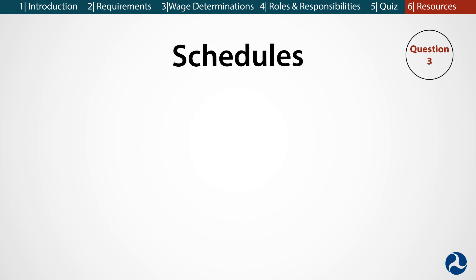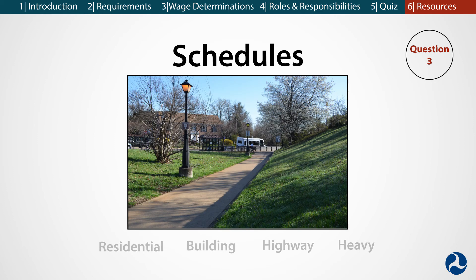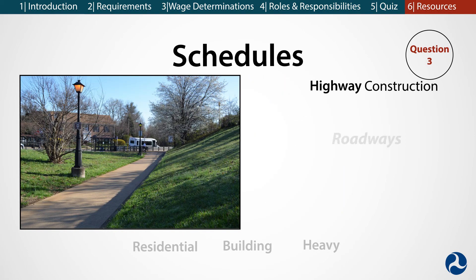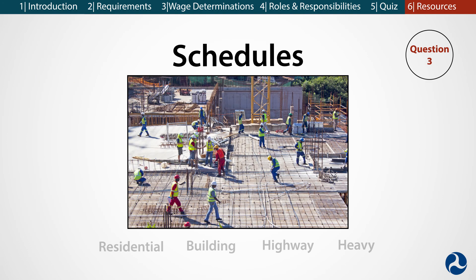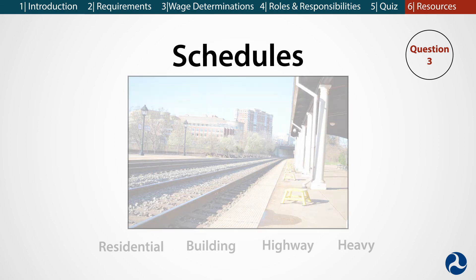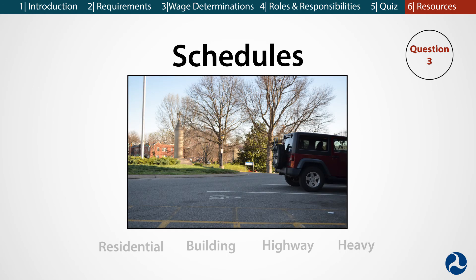Question 3. What schedules are associated with the following types of construction? The four construction schedules are residential, building, highway, and heavy. In the first image, we see a sidewalk being built from the main road to a rail station — this is highway construction. The second image shows a new rail station being built, classified as building construction. In the third image, we have the construction of a mainline track, which classifies as heavy construction. Finally, we have the construction of a parking lot at a rail station, which is also classified as highway construction.